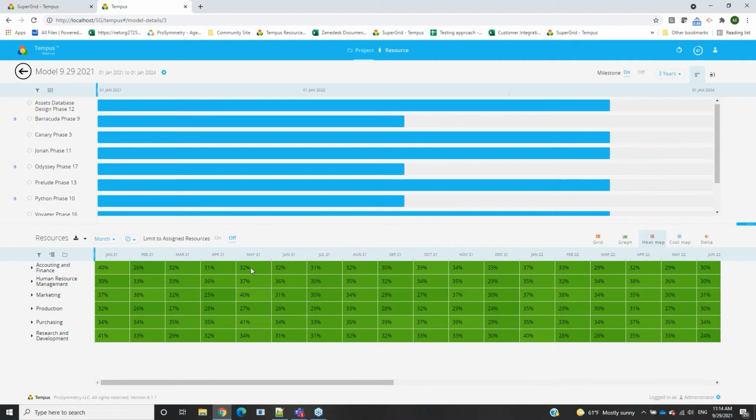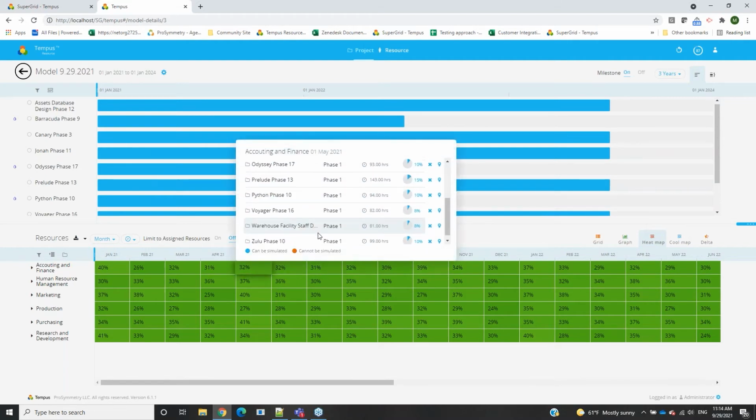If we drill into here, we're going to see this information, and there's always the potential that a user is unaware of the filtering. They see this and think, whoa, all of our resources within these different departments are under allocated. What's going on? Why are they under allocated, what needs to be changed, could we add more projects? That can lead to the false positive conclusion that everything looks under allocated, just because they don't have a full understanding of all the allocation in the system.